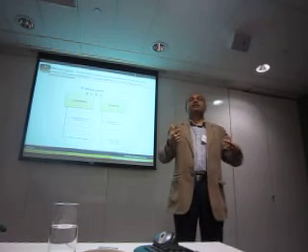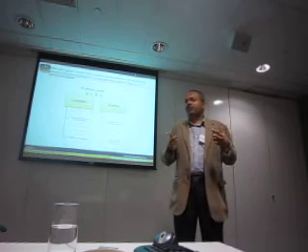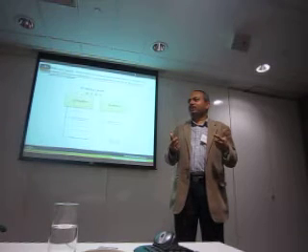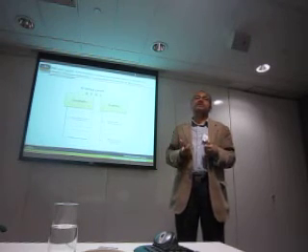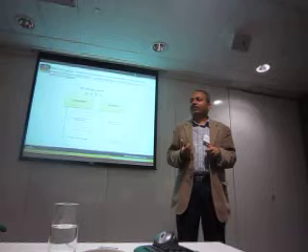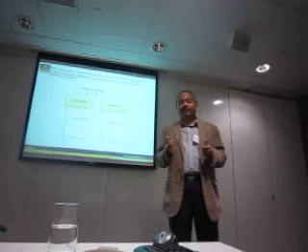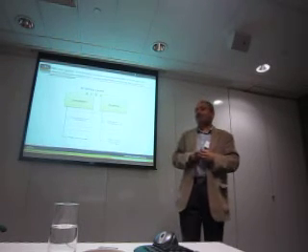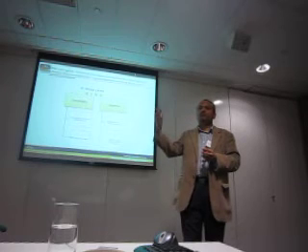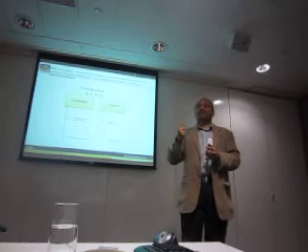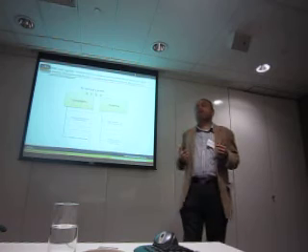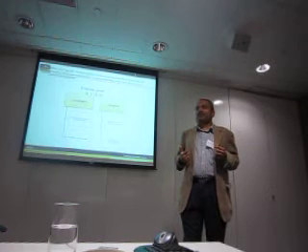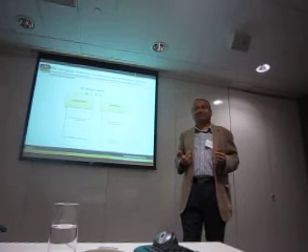We just have a boxing exercise, boxing tournament between these 4, and then one of them wins. And therefore, in Agile, we allow the user, the super user, the key stakeholder, to pick one variable. You pick time, I'll pick the rest 3. You pick budget, I'll pick the rest 3.